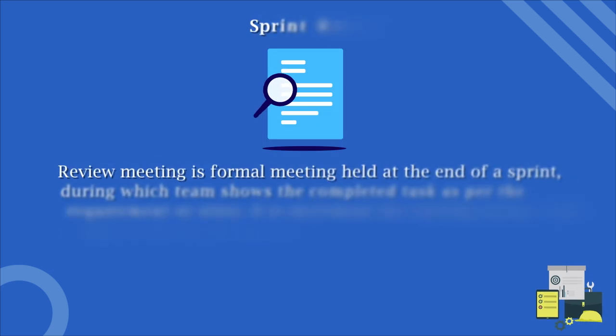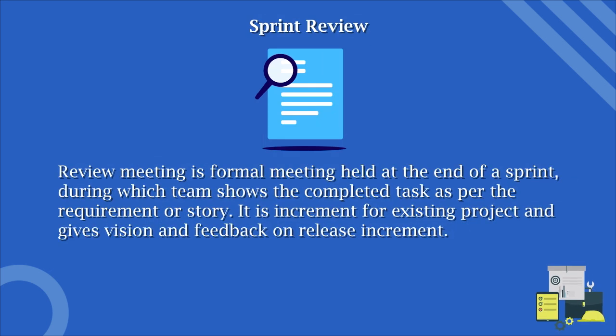Sprint review. The sprint review meeting is a formal meeting held at the end of a sprint, during which the team shows completed tasks as per the requirement or story. It is an increment for the existing project and gives vision and feedback on the release increment.